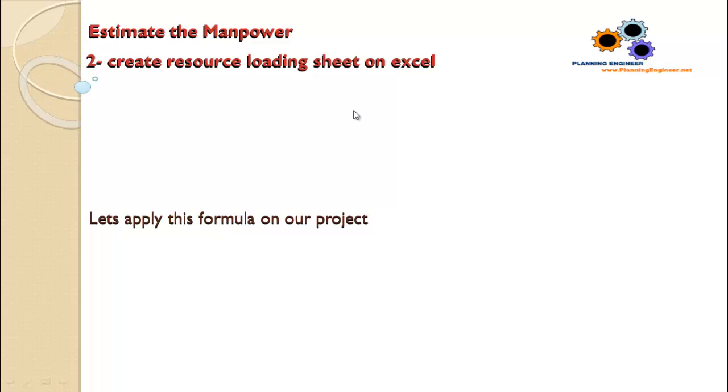Let's create the resource loading sheet on Excel and apply this formula in our project. About 90% of the activity will have the duration already fixed, and you can just modify the duration a little bit if you find that the manpower required or the daily manpower required is too high.